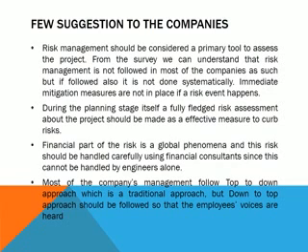During the planning stage itself, a fully fledged risk assessment of the project should be made as an effective measure to curb risks. The financial part of the risk is a global phenomenon and this risk should be handled carefully using financial consultants, since this cannot be handled by engineers alone. Most companies' management follows a top to down approach, which is a traditional approach, but a down to top approach should be followed so that the employees' voices are heard.